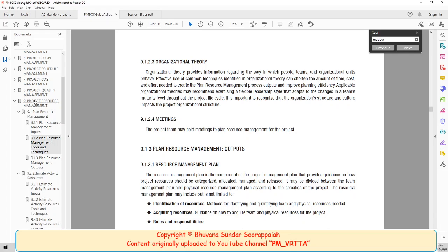down the previous project. So you have an unknown problem for which you need an unknown solution. So from unknown problem you go to a known problem, which is the past project. You get a known solution, which is the past project's estimation, and then from that you get an unknown solution. And then you break it down and then you say at the top this was a similar project. Analog means similar, right? So I will use that as a top estimate, and then I will break it down, and wherever there are discrepancies I will add plus or minus, and finally I will fine tune my top level estimate based on the differences between that project and my current project.